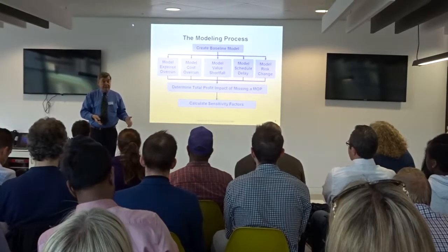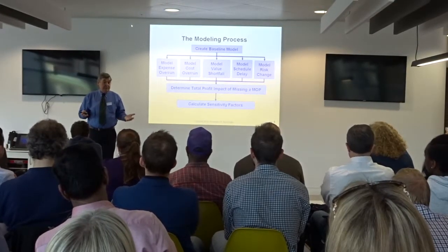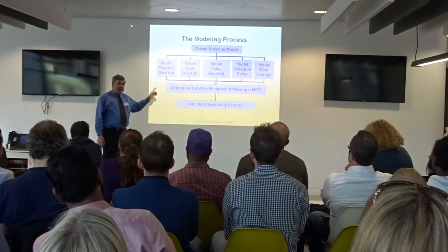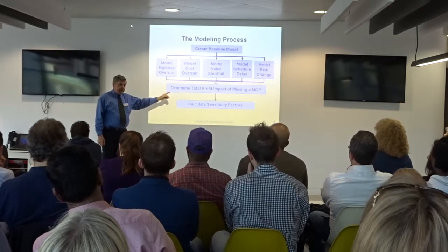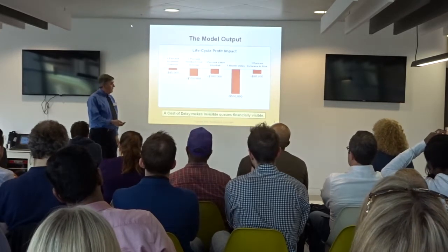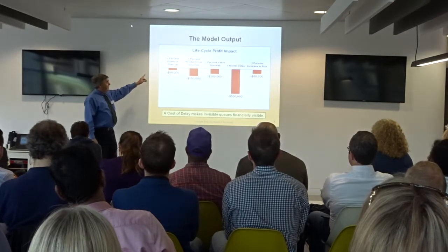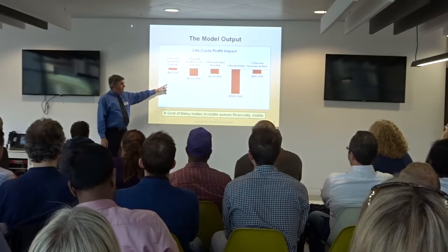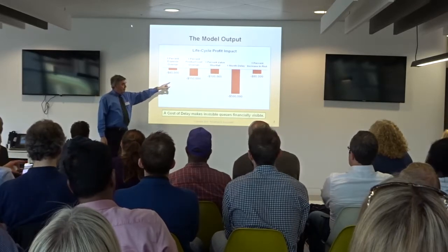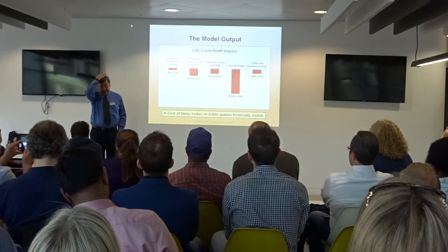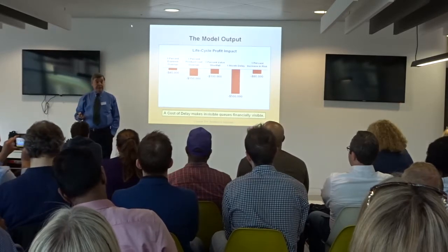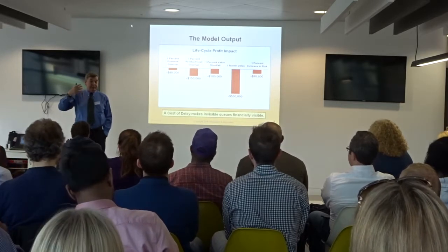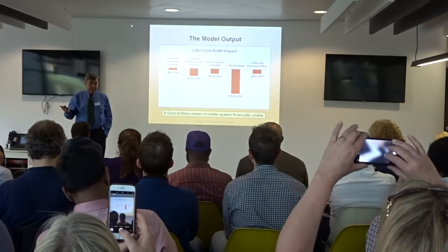being 60 days late. It's a very simple concept on sensitivity analysis. We normally change one variable at a time and see how sensitive lifecycle profits is to each one. And we get out an output that looks like this. 1% expense overruns worth $40,000, 1% cost overruns worth $150,000, 1 month delay is worth $500,000. And that then brings everything into the same unit of measure. And now we can start making decisions in a sort of fact-based way instead of in a qualitative way.